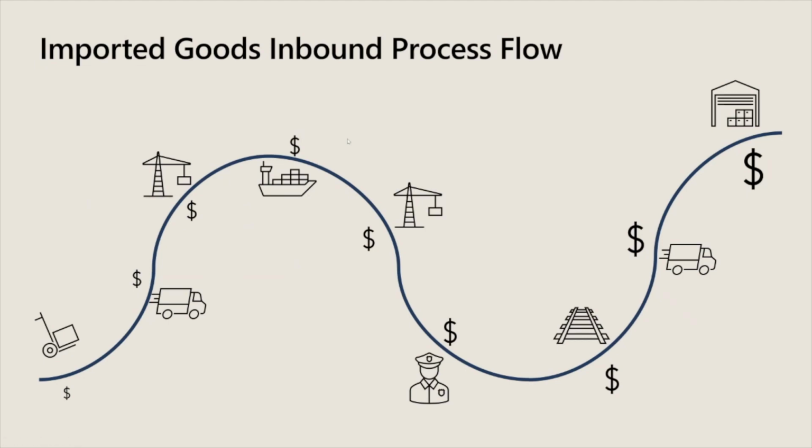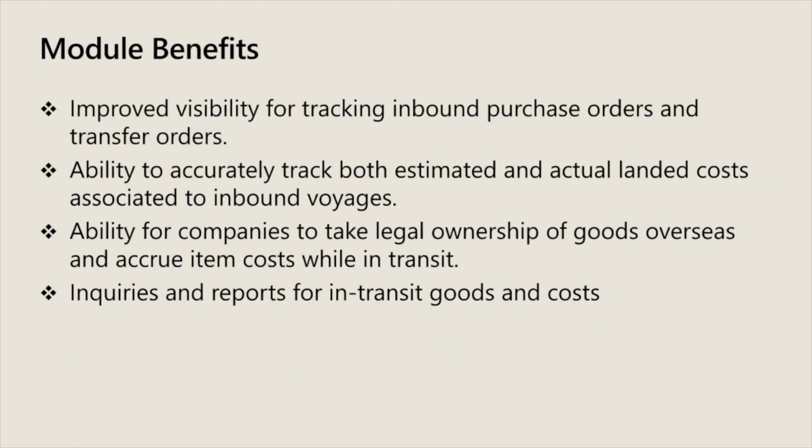From a module perspective, within the application, what the landed cost module provides is, in addition to the costing that I mentioned on the previous slide, improved visibility and tracking of those goods. Throughout that journey, we now have the ability to record as each of those different steps is executed: as it's leaving the vendor, arriving at the port, on the water, getting received, you can be updating the status, and we can be setting up lead times that will give us an accurate picture of when we realistically expect to receive those goods.